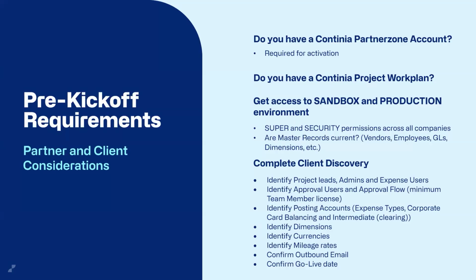If you can get all of this information prior to the install and activation, that really just prepares you to completely set up the environment before the client even gets introduced to the solution and starts testing. A lot of what expense management is that initial setup. So once you've set up the environment, all that is left is for your client to test and get comfortable with using the solution.